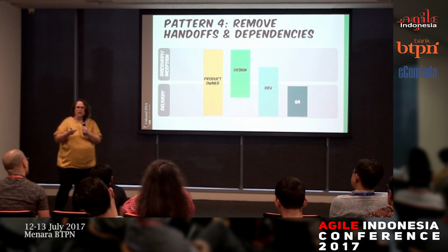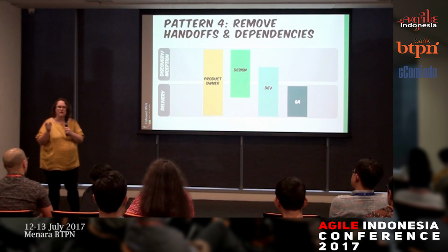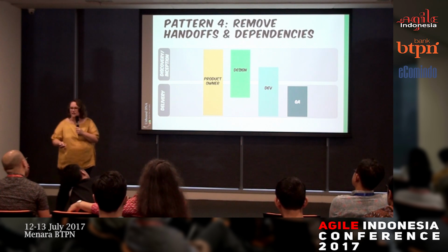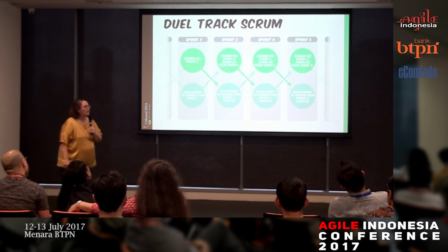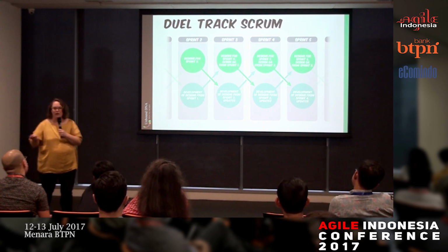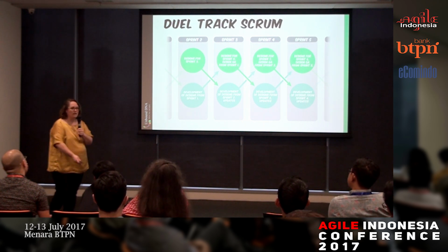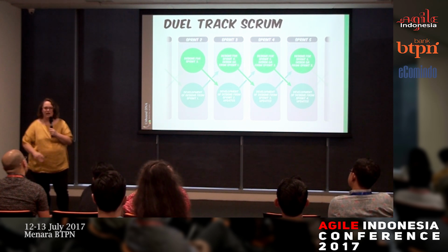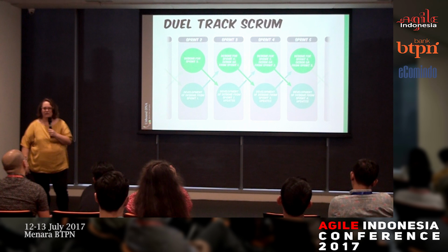They're doing design work in advance of the team. The product owner and the designer are there. And maybe if they're lucky, the developer gets a say in that as well. And this is what it sort of looks like as what's called dual track Scrum, right? Always one sprint in advance. And then there's some testing that's happening a sprint after the development's been done.